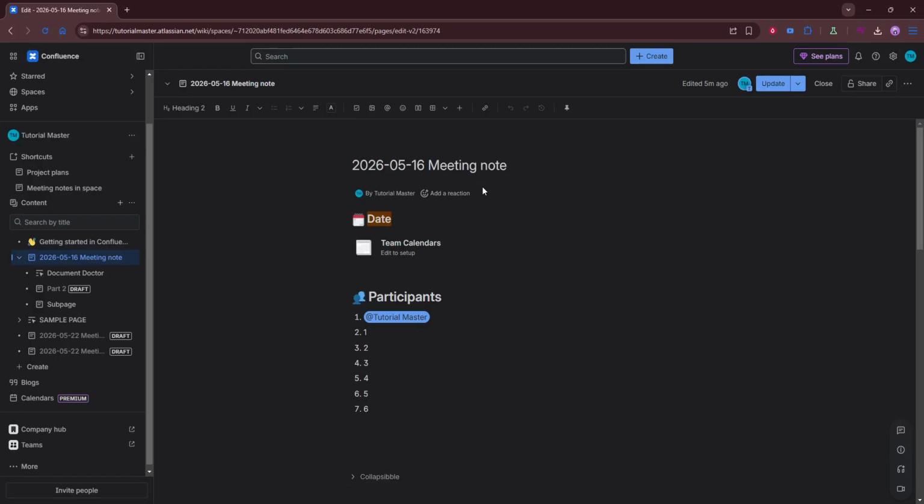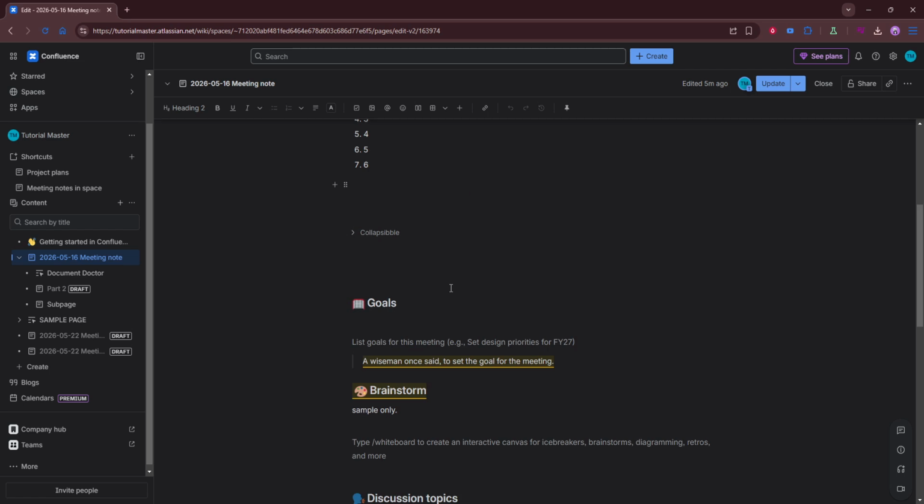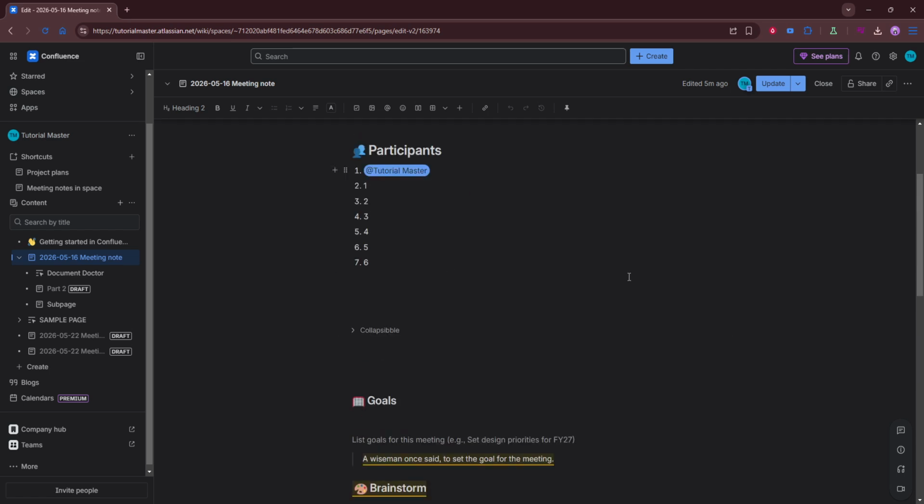Now create your columns. The classic trio is To Do, In Progress, and Done. To Do holds everything waiting to be started. In Progress shows active work. Done captures completed tasks so you can see progress at a glance. Keep the column names short and intuitive. If your team uses additional stages, you can reflect those in the column names, but keep it simple so the board stays easy to scan.